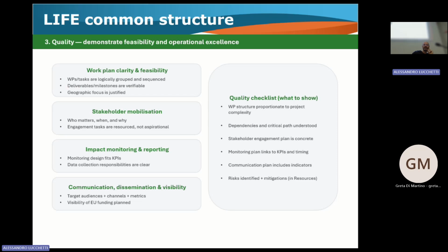The EU Commission took this material and said, okay, we do not recognize this expense, because the risk is double financing for the same thing. You have to demonstrate in the budget that you are buying this PC specifically for the project and solely with the EU budget. If you put other logos, etc., the risk is to have a double financing and the EU Commission cuts the expense.